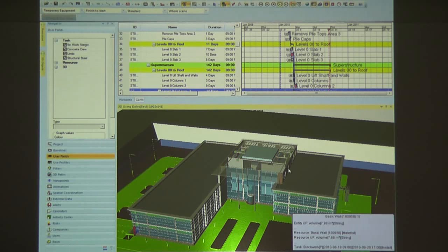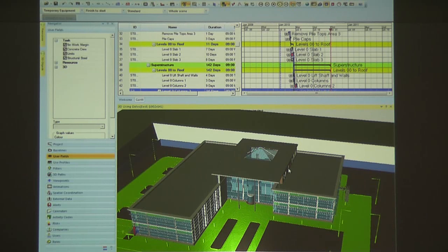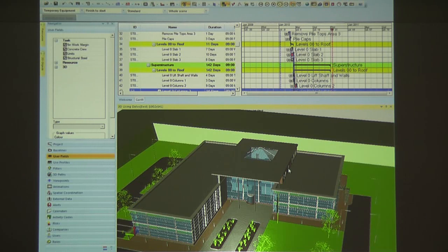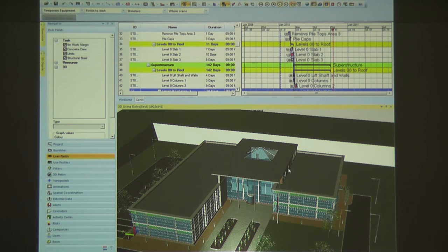The glass is being installed, the parking lot, sidewalks, and curbs were poured, glazing put on top, and then finally your landscaping, trees, light poles, until it's finally done like that. So this software was neat to demonstrate in the interoperability world is we took a Microsoft Project task list, bound it to a 3D element inside of SDS2.